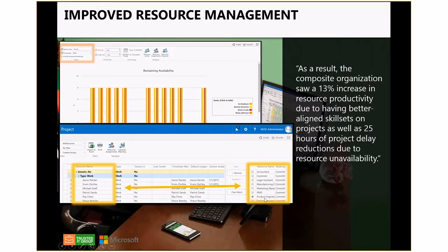And very simply, you could just go into the resource planning, resource capacity module and just select the product engineer. You press the match button and it automatically looks through the resource pool to see who's assigned that particular role of the product engineer. So again, you're going to have your resource pool configured the right way to have this type of information, but it can be done and it saves a lot of time.